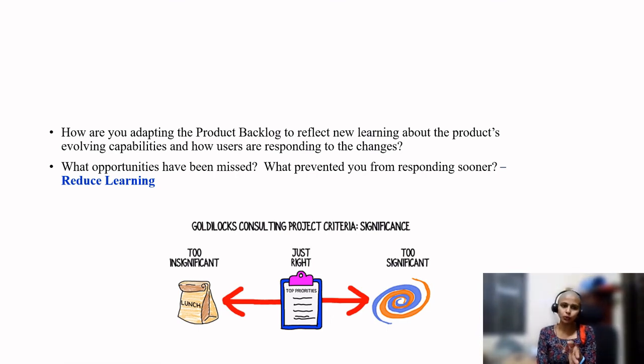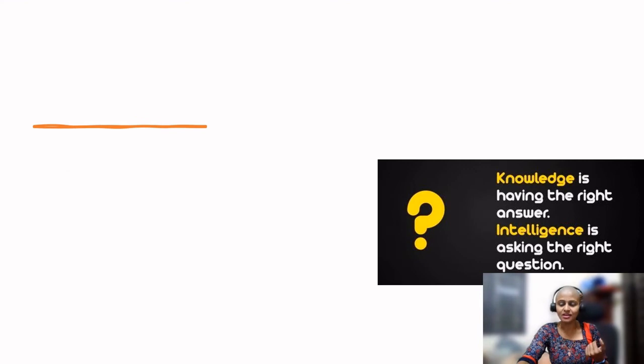Sometimes we don't want to refine so many items. Sometimes don't do the less prioritization as well. And what I mean by that is always be ready with your product backlog items for the next 2 sprints. Don't have insufficient product backlog items, and also don't refine too many items. Both are harmful. Okay, so have it just right. Just right is having just the right numbers. Don't do too much, don't do less as well. And moving on to the next slides.